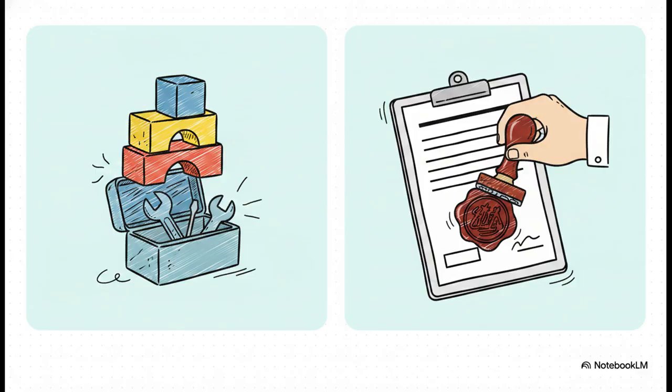This confusion right here, between finishing a sprint and releasing a product, is where so many teams fall completely out of compliance. Sprint completion is just an engineering event. Your definition of done is met, which means the software is potentially releasable. But a formal product release, that is a strict, undeniable quality system act. It requires a hard gate, a comprehensive review of all your evidence, and a named, competent approver who actually signs off on placing a medical device on the market. Basically, a sprint finish is a promise your team makes. A product release is a strict regulatory authorization.